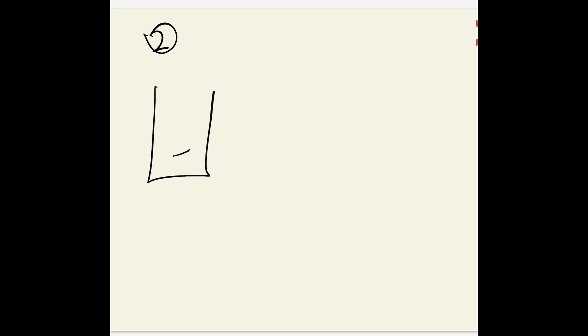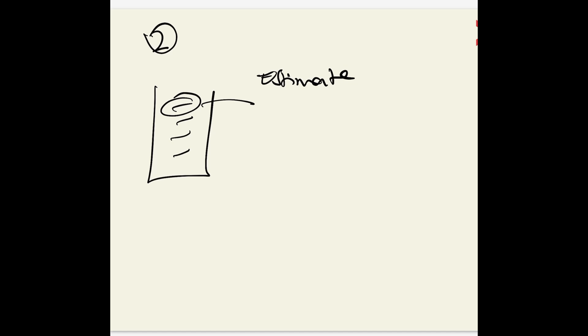The second thing you need to do is take each of these stories in the product backlog and estimate them. If they know what the actual story or requirement is, you can use the Fibonacci sequence: 1, 2, 3, 5, 8, 13, 21.